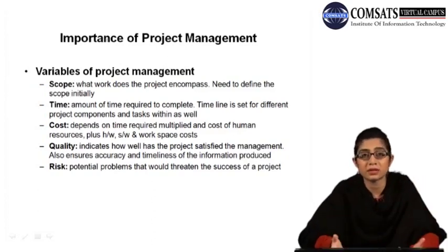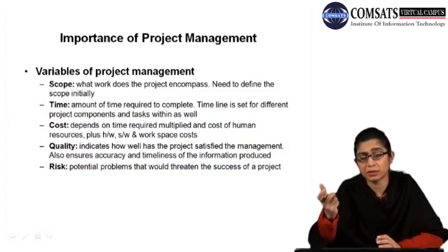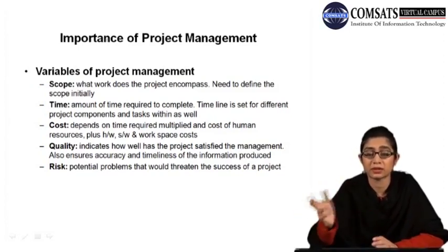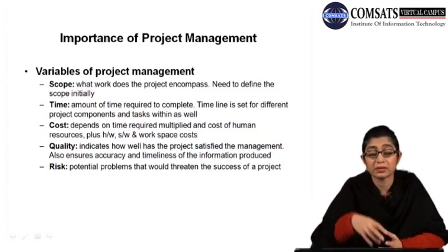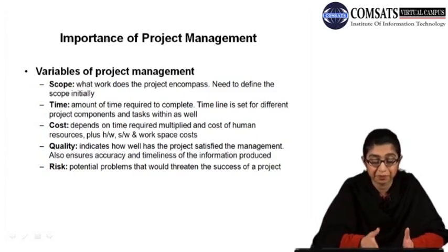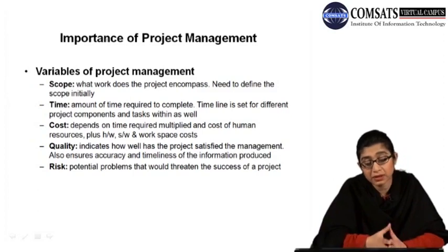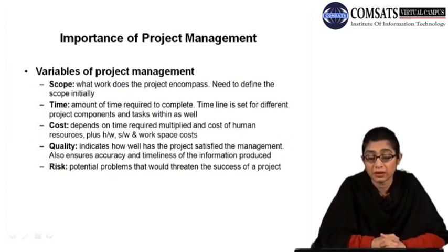Again, you use certain software to define your timelines and set milestones, that this task is going to be completed by this time, etc. Then there is cost, which depends on the time required multiplied by the cost of human resources. Plus the hardware, software and workspace costs are also included in the cost dimension or variable.